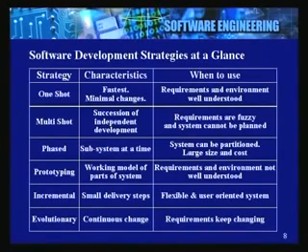Last but not the least, is the concept of incremental activity. What is the incremental thing? Suppose there are several functions to be delivered by an application. Okay, then you can categorize these particular functions in an ABC manner and say which function will deliver the maximum benefit to the organization with minimum time, money and effort involved.